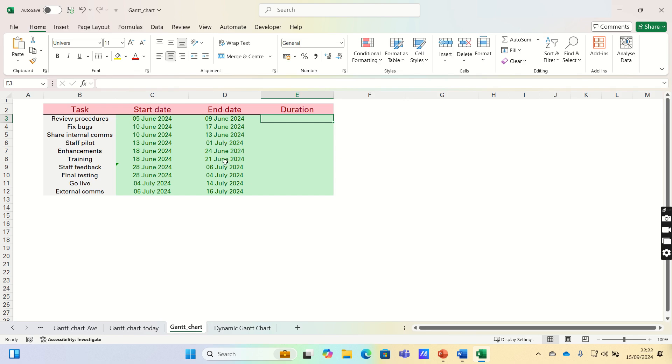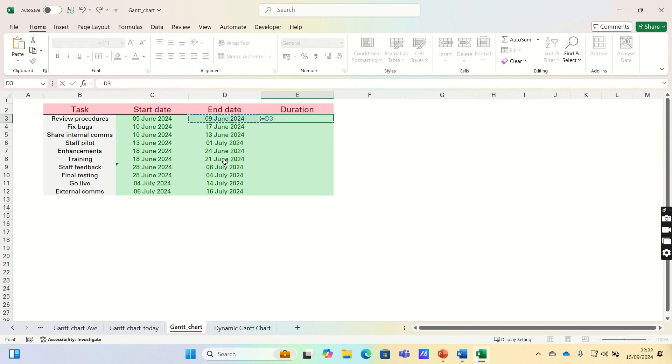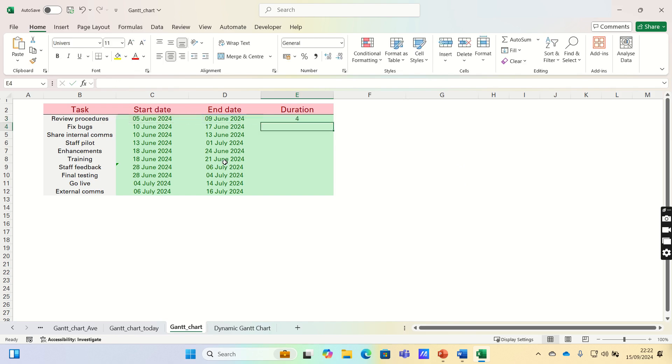The next step is to calculate the duration of each task. This is the end date minus the start date. We can then drag this down to apply the formula to the remaining cells.